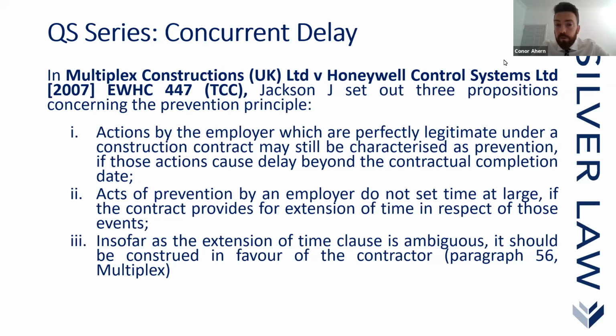And it's for this very reason, because employers want to avoid situations where contractors put forward arguments that time is now effectively at large, because time at large basically means that the original contract completion date falls away, and the contractor has to complete within a reasonable time, and therefore is not susceptible to deduction of damages also.